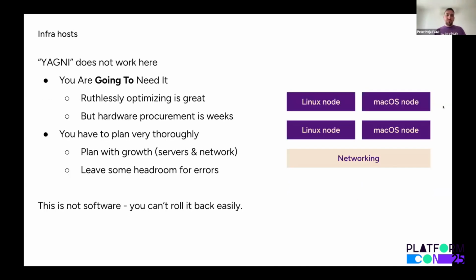Lastly, you ain't gonna need it. Mantra from software engineering is not gonna work here. You are going to need it. You will ruthlessly optimize, as I said, and that's great, but there are things that you should not optimize out. That is error margins and having some headroom for errors, because you might procure hardware today that's going to arrive 2 months from now, and then it will be deployed another month later, and you will have twice the users.